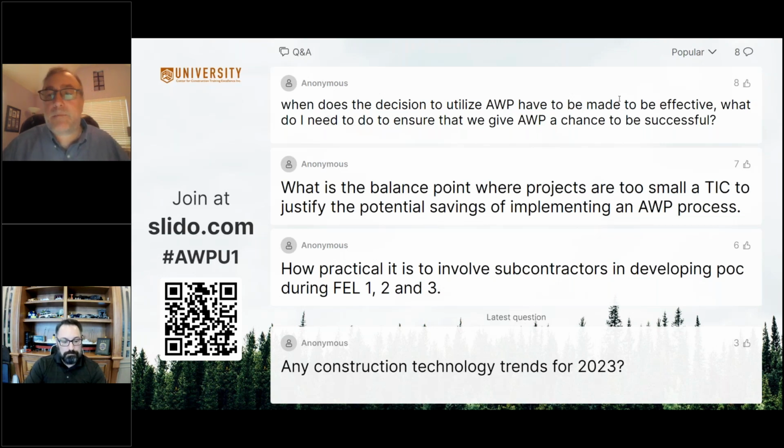So a core AWP team, and to have it resourced and get the owner to resource it. You need somebody that's going to be a construction manager that can oversee the effort. You need somebody that's going to be a super user, and you need a data admin. It's that core team of 3 folks, typically at the owner level, that really set it up for success in the whole project team. But you need to do that and look at it programmatically.